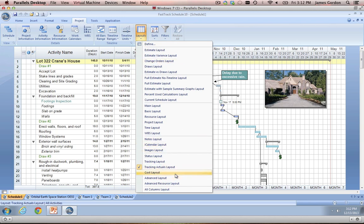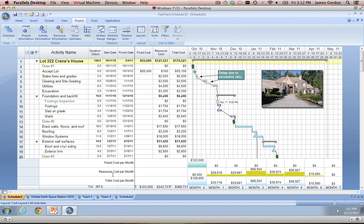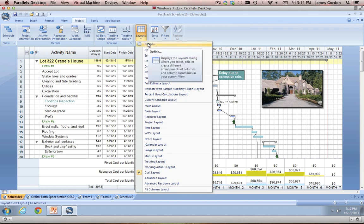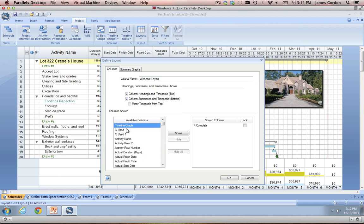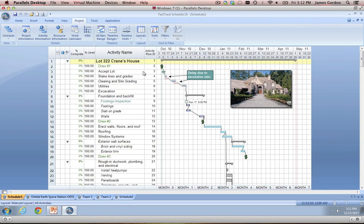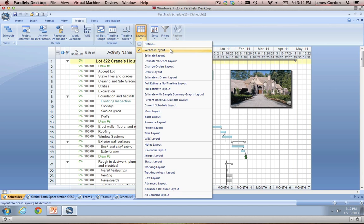One more example of a layout is our cost layout, which will include a couple more cost columns as well as some summary graphs set up specifically for costs — so once you enter in things like fixed costs and resource costs, it'll go ahead and calculate total cost for the project and total cost per resource. You can also create your own layouts in FastTrack by going to Layouts, Define, and New — here you can insert any columns and summary graphs that you want to show in your schedule. Once you press OK and apply, only those columns and parts of the timeline graph will be showing. Once you create this layout it will always appear in your custom layout section so you can use it over and over again.